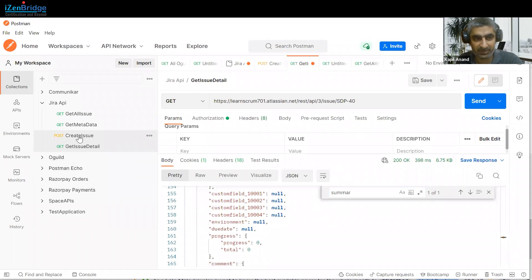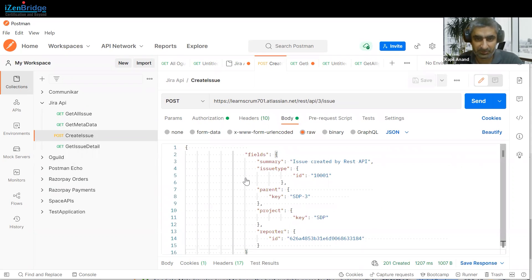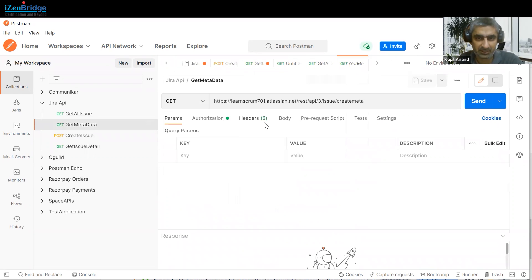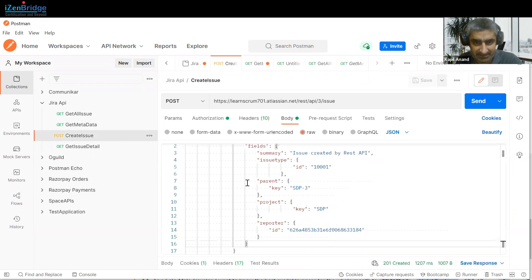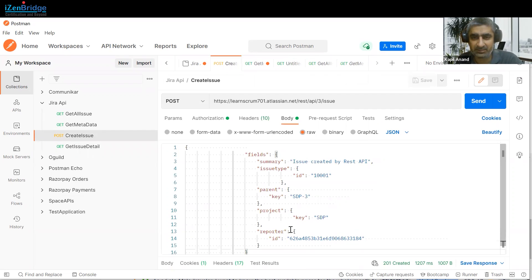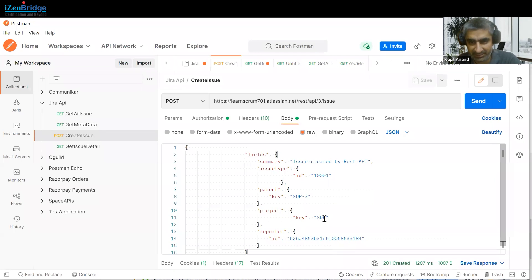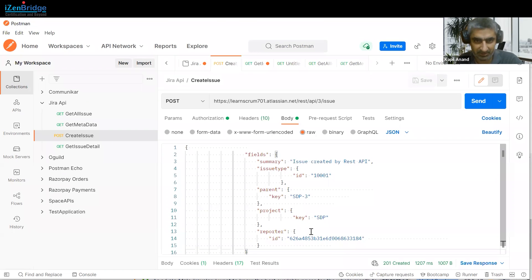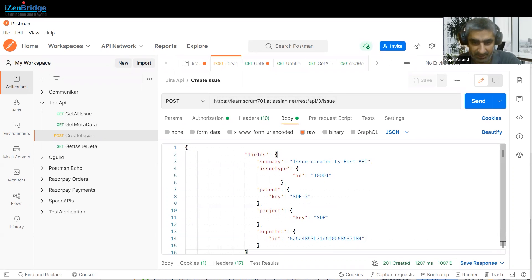Now let's see an example where we create an issue. Based on the metadata we fetched earlier, I have created this request structure and included only the mandatory fields. For creating an issue, I just need a summary, an issue type ID (this ID represents a Story), a parent ID (epic would be SDP-3), a project key of SDP, and a reporter ID which is the user ID. The summary is 'Issue created by REST API.'